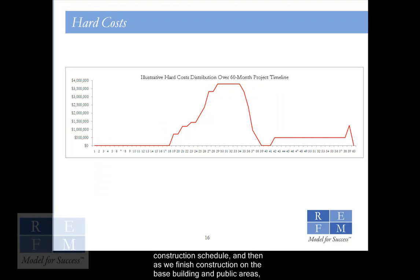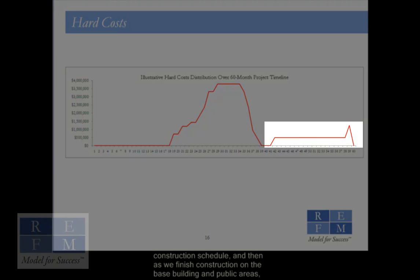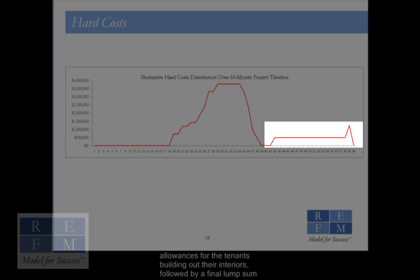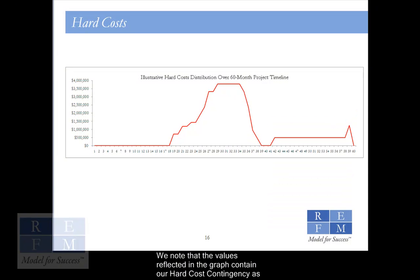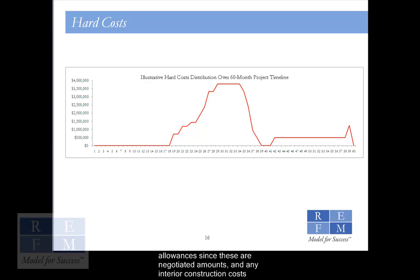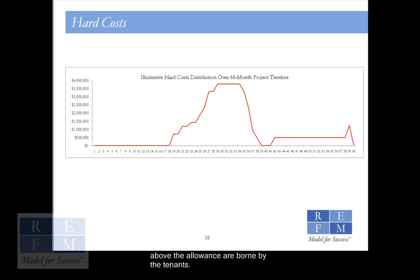As we finish construction on the base building and public areas, we note that we have a plateau, which is a payment over time of the tenant improvement allowances for the tenants building out their interiors, followed by a final lump sum payment to the last of the tenants. The values reflected in the graph contain our hard cost contingency as well, but this contingency does not apply to our tenant improvement allowances, since these are negotiated amounts, and any interior construction costs above the allowance are borne by the tenants.